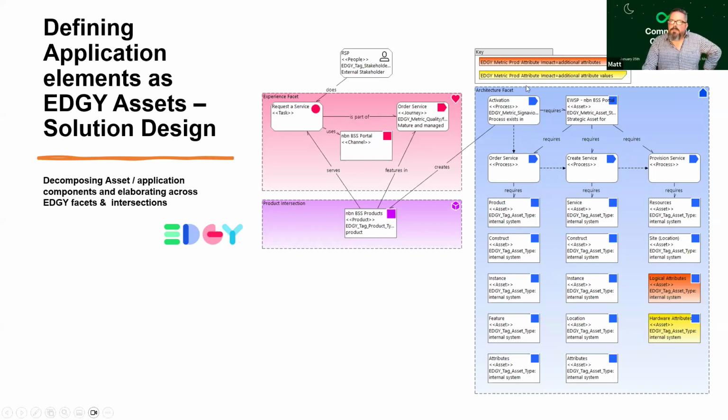We were doing some initial sizing for the development task. If we have to just add some attribute values within the code, that's a medium t-shirt size. If we have to add additional attributes and values, that's coding rather than configuration. That's a large t-shirt size.